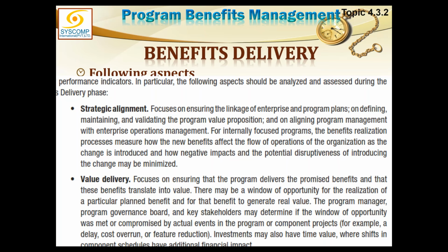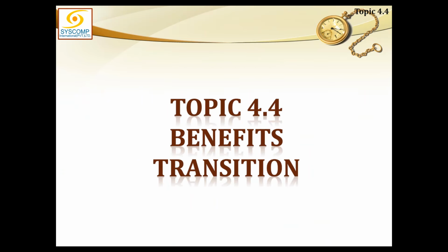The program manager, program governance board, and key stakeholders may determine if the window of opportunity was met or compromised by the actual events in the program or component projects, for example, delay, cost overrun, or feature reduction. Investments may also have time value, where shift in component schedule have additional financial impact.